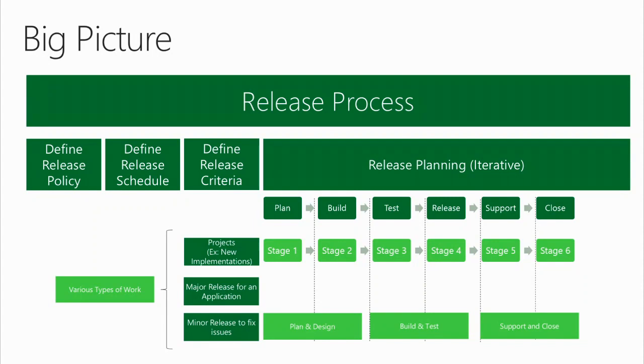The solution in that case should have been that user testing should not have happened during my development cycle. Both should have been synchronized so that we all know we have released it for user testing, and no changes are supposed to be made until after the testing is complete. So things like that. That's a minor example. When you're talking about bigger ERP systems, it gets even more complicated.